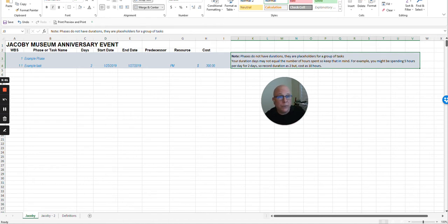Other times, when you are forecasting what a project duration would be, it's the other way around, where you have your phase, like your phase 1, then you bake in everything that you have to do and put timing to it, and it actually calculates your overall phase timing.